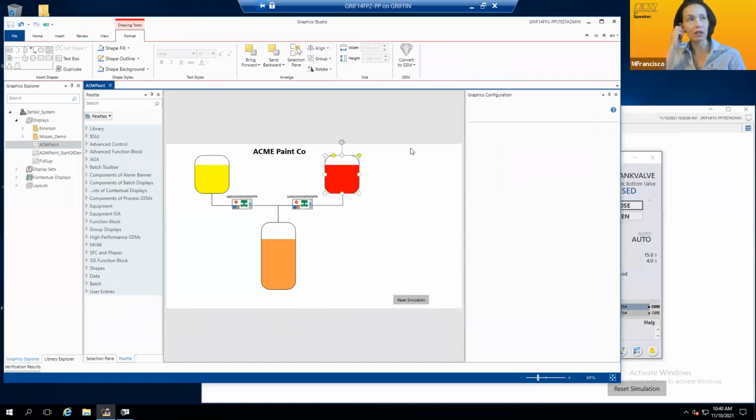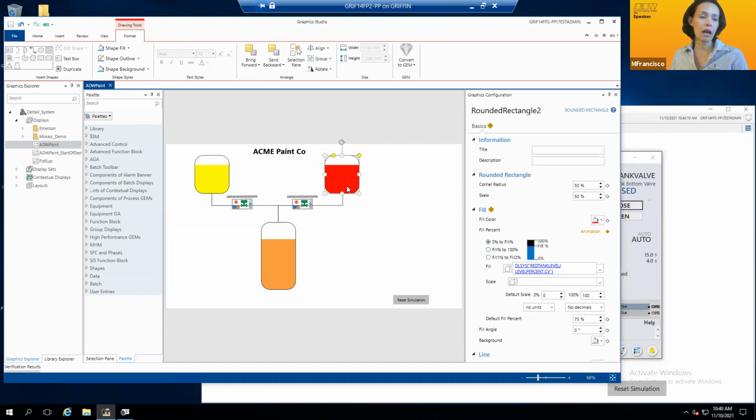And while folks are adding things on the post-it here for 1B, I also wanted to point out the rhythm that Dwayne used here. He demoed, he paused, and then he asked, is there any specific feedback on what I just demoed? Having that rhythm of showing, breaking the demo into small chunks, and asking for feedback, both verbally or by adding stuff on Mural or whatever tool you use, we found that's more manageable and we're able to gain more insights that way.